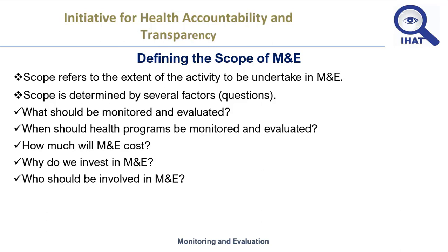Monitoring and the evaluation process should occur throughout the life of a program. Outcome and impact evaluation are usually done near the end of a program. Baseline is gathered to measure change. Starting MIE at the beginning of a program is ideal. Some activities can still be measured if MIE is started in the middle of a program. Even fewer activities can be measured if MIE is started towards the end of the program.